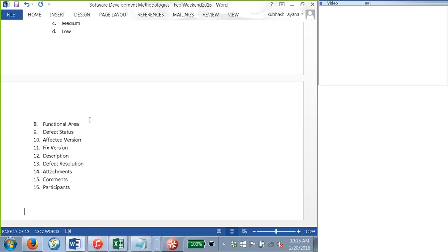So what we are asking the testing team to do is also associate the functional area in which they have identified the defect. All the developers have to do is filter this report by the functional area and start looking at it, right? So out of 100, when I filter by, let us say, login, I will see that okay, there are only 10 defects. So all I'm worried about is those 10, and they have to assign the right functional area.